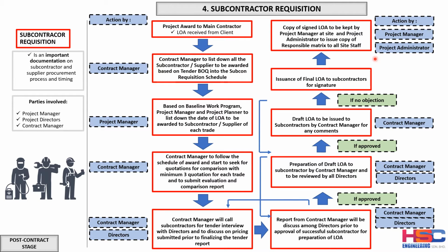This is very important so that the site staff, like the project engineer, the supervisor, the site agent, the construction manager, will know the roles and responsibilities, which is the responsibility matrix, for the main contractor and what are the responsibilities of the subcontractor.